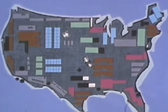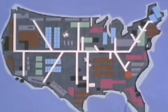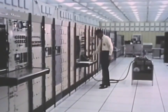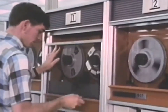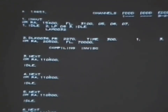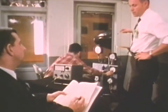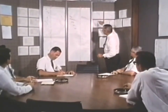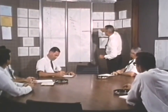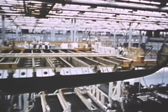As the massive project moves forward in the subcontractors' plants, a special computer system at Lockheed digests hourly inputs from all across the nation. Any test that fails, any schedule drift, any design shift, any shortage. Project managers are advised of trouble immediately and can take action before it grows. And production hits a peak of activity.